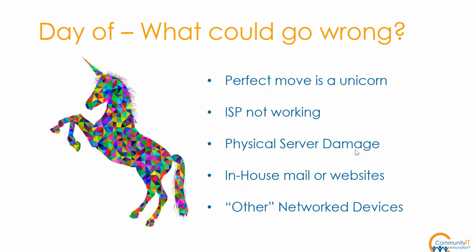Yeah, if you still host your own email, have your own Exchange server, emails will be unavailable during the time that the server is physically in a truck. So ideally, you have another service that can spool it in the meantime, so that when people come back online, it'll all just sort of flood back in. I find that in the beginning, around the 3 or 1 month mark, it's good to put on email signatures that you're moving, so everyone knows that you may be unavailable on this day for a period of time, not to call the police. Yep.